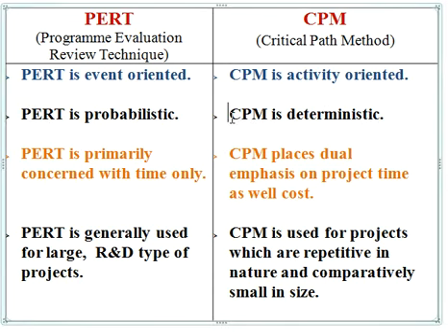All the data are available from our past experience or as per the record book, while in PERT no such data are available. We are assuming the data probabilistically. PERT is generally useful whenever R&D kinds of activity are involved, or a newer project needs to be completed where past data is not available.